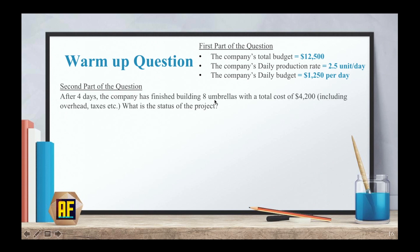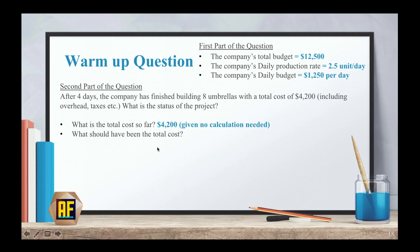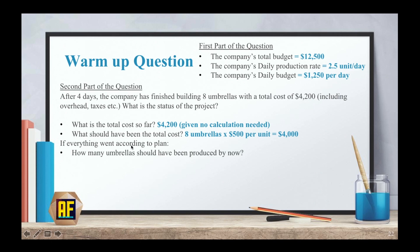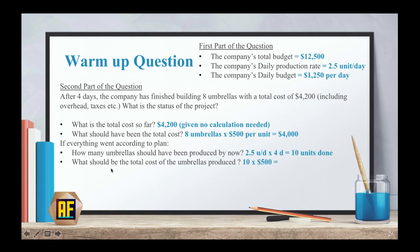After 4 days, the company has finished building only 8 umbrellas, with a total cost of $4,200, including taxes. The total cost so far is $4,200. What should have been the total cost? We have 8 umbrellas times $500 per unit, which equals $4,000. If everything went according to plan, how many umbrellas should have been produced? We know we generate 2.5 units per day times 4 days, so 10 units should have been made. That gives a planned cost of 10 units times $500, which is $5,000.